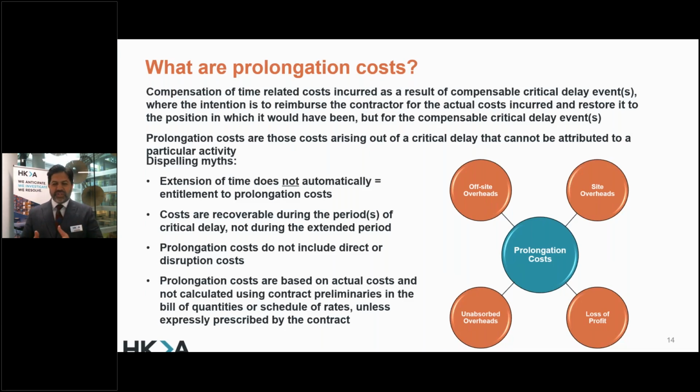Now, delay cost claims are claims for necessary logic or duration revisions adjusted to allow for mitigation measures and all excusable and compensable events during the delay's cost. Therefore, a delay cost is a claim for delay where a contractor or a consultant must show to the client that the cause of the delay is one that entitles them under the contract to payment for extra costs incurred. What does that mean in reality?